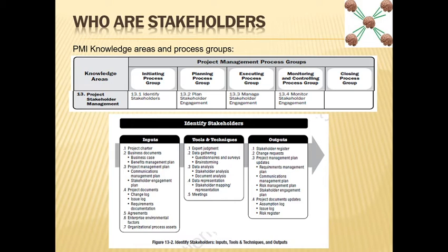For example, if this is a very influential stakeholder and he brings some major change, and that change has time and schedule implications, you have to put in a big CR and change everything in the project. So stakeholder identification can mean change requests as well.